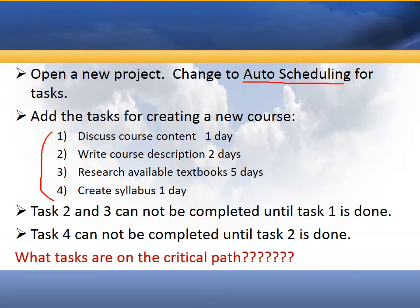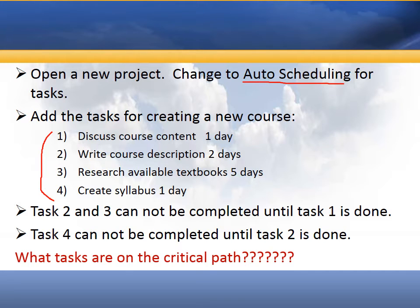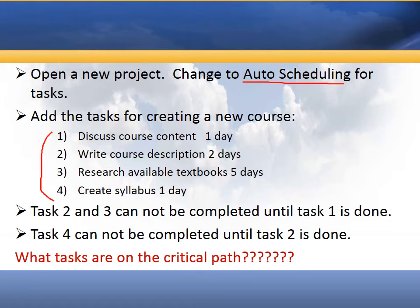Task two and task three cannot be completed until task one is done, and also task four can't be completed until task two is done. So let's see how that looks when we plug it into Microsoft Project.